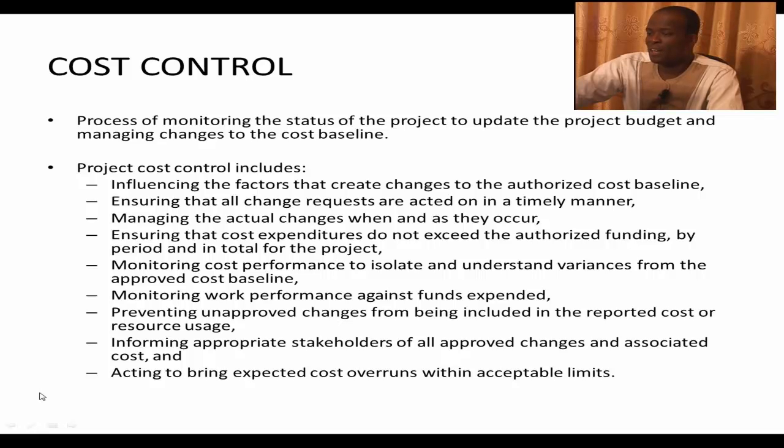Project cost control also includes ensuring that cost expenditures do not exceed the authorized funding by period and in total for the project. So if you give yourself, depending on how the work goes, one month an amount of money, and then two months another amount of money, you don't wait till the end of the project before you find out. You can phase it so that you know at the end of this phase you should have spent this much. And project cost control can help you to monitor these and to take the necessary actions.